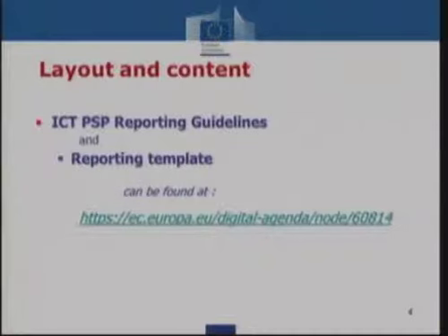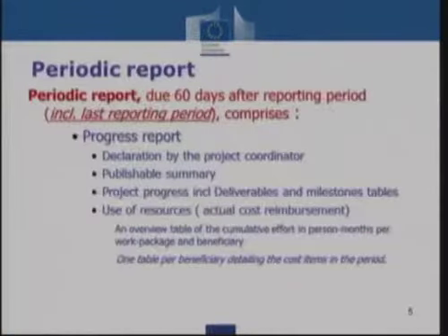We do have 90 days to evaluate the reports and the deliverables and to make the payment. So within these 90 days, as I said, we have this habit of having a review meeting, so we also need to plan our review meeting accordingly. Because the payment is made after approval of reports and deliverables, and that's exactly a process we do within a review process.